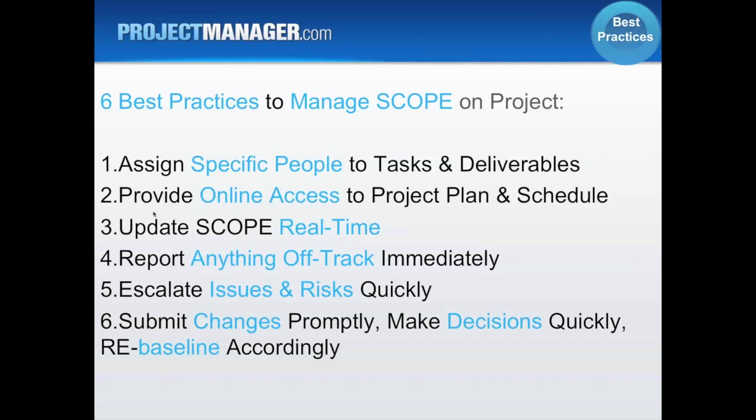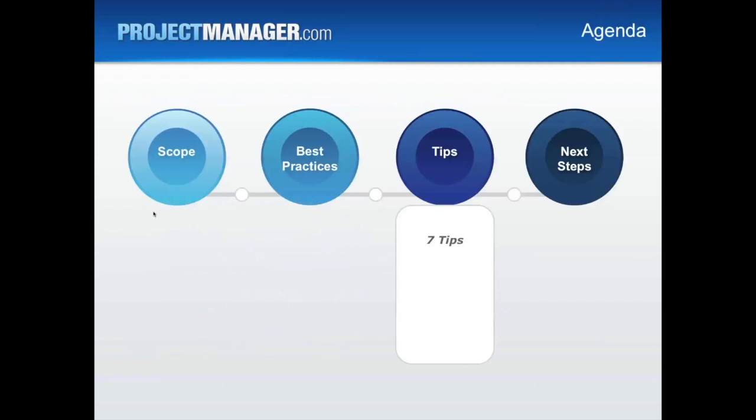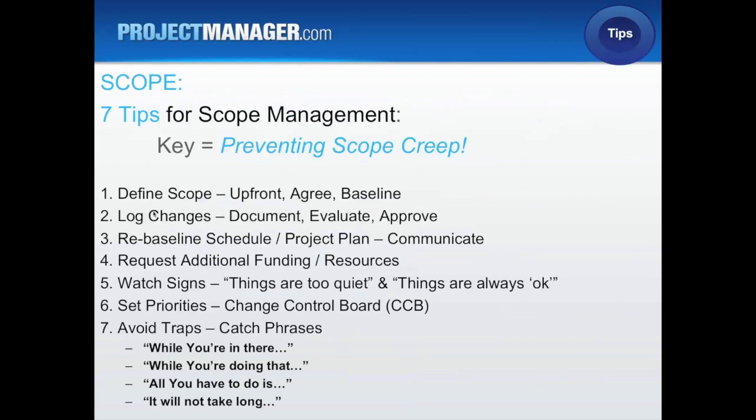If you as the project manager do not do that, then it's your own fault, because that is your opportunity to rebaseline the project. It's the approval from the change control board, which includes your stakeholders, customers, the people paying for this. They're saying they've made the decisions, they've agreed, and they've approved that things can change. So when you rebaseline, you're rebaselining your timeline, your cost, your budgets, all of that. So rebaseline accordingly.